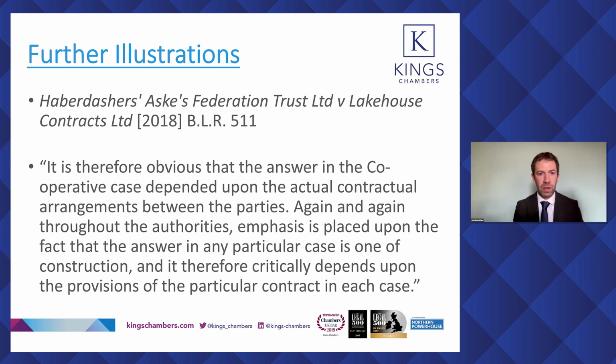This was another case in which the co-insurance defence was deployed but was unsuccessful. It was a case where on the face of it, there was a policy which appeared to cover the relevant parties in respect of the relevant risk. But the quote on the slide again makes the point that it's generally not enough that there is a policy in joint names or in which both parties have an interest registered, and reference must be made to the underlying contract to see the extent of each party's interest in the insurance policy.